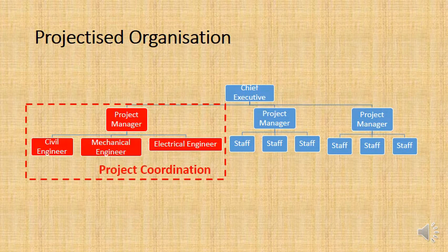Who's going to make sure that I've designed everything carefully? Well, I can't take it to the project manager. He knows nothing about civil engineering, nor the mechanical engineers or the electrical engineers. So you've got to make sure that you've got senior engineers for all of the disciplines who can also review work.